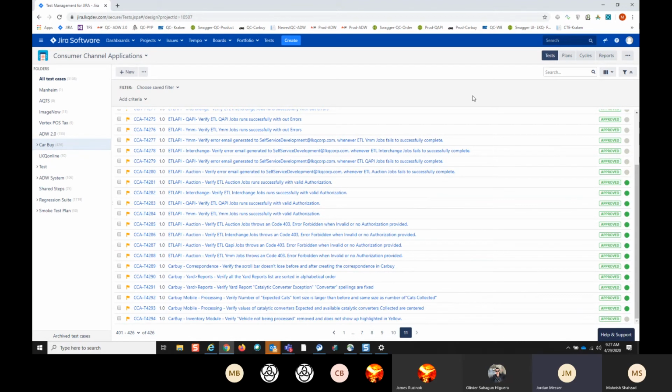All in all, everything that she mentioned, the iteration bugs is critical, test cases is critical, how to create it, how to make sure we link it to the appropriate issue. An iteration bug is anything we find during the sprint related directly to sprint work. Bugs are related to anything outside of the current sprint work. That was a big sticking point we had to figure out for a while. But as we get through this more and more, I think you'll see how this all comes together, and it should be coming together now for you with the BA, the dev, and the QA portion of it.